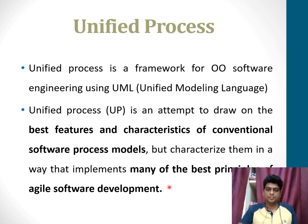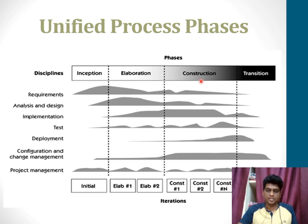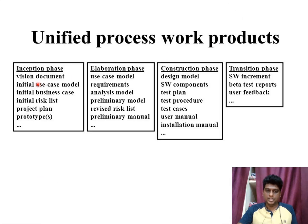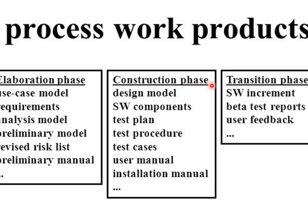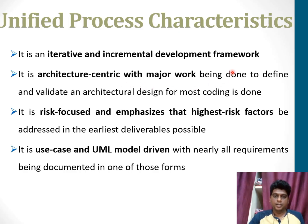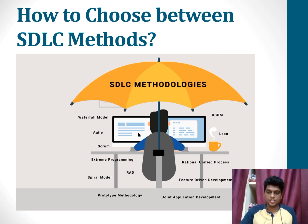The next process is the Unified Process, whose framework is based on the Unified Modeling Language (UML). It draws the best features and involves characteristics of various process models. Its phases are inception, elaboration, construction, and transition. Each phase covers requirements, analysis, design, implementation, deployment, configuration and change management, and project management. In the inception phase, a vision document is created, the use case model and business case are initialized, and the project plan is made. In elaboration, requirements and analysis models are developed and the risk list is revised. During construction, design models are built using all software components and software testing is performed. In the transition phase, feedback is obtained after releasing the beta version. This is a risk-focused framework driven by use cases and UML models.